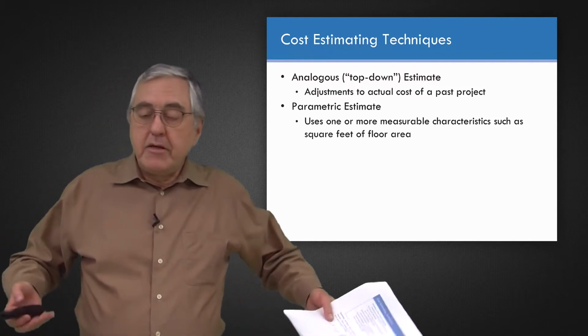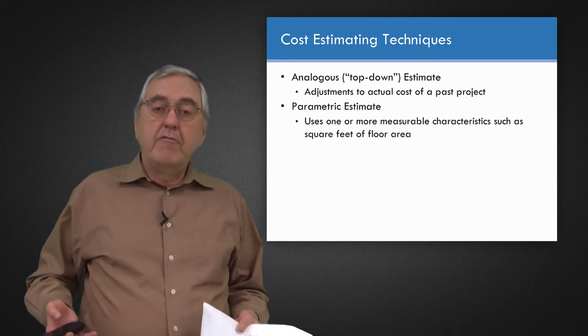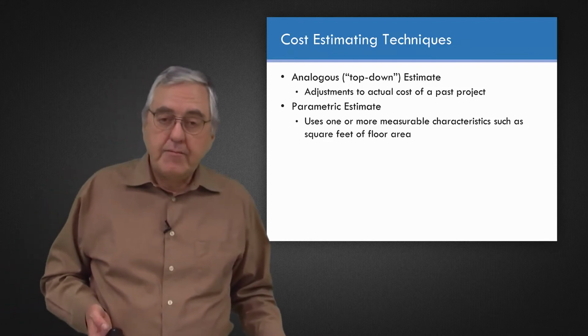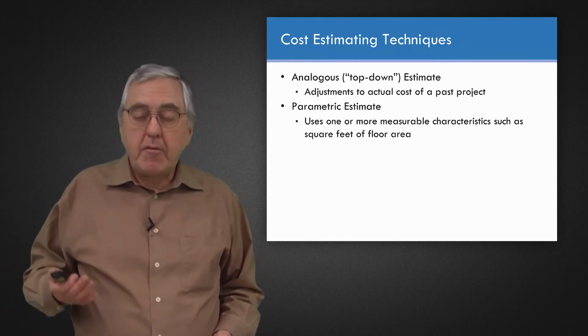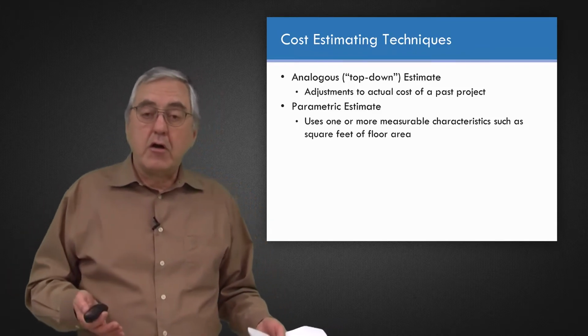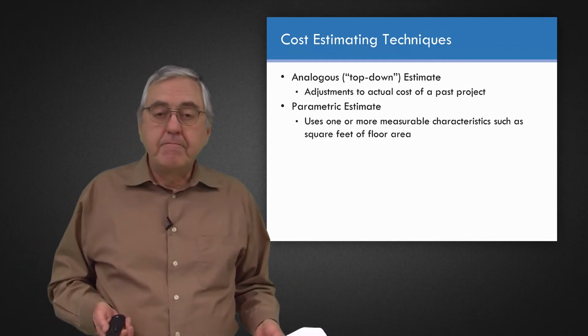So Bob can immediately give him an estimated cost for the construction, design and construction of that project. And it's based on the fact that Bob, in his head, has a parametric estimating model, basically, that says it would be this many dollars per square meter of space for hospital ambulatory care.